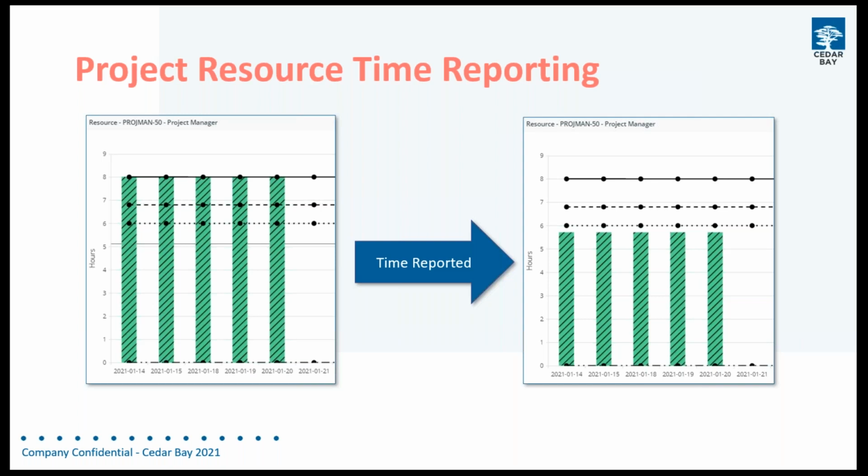What we don't want to be doing is continuing looking at this bucket of 200 hours for an activity that's not finished. So if we've associated a person with a resource group, when they've reported their time for the resource group that they belong to, the number of hours in our capacity plan actually reduces by the total number of hours that have been booked. In this case, I've got 8 hours a day loaded for this particular resource.